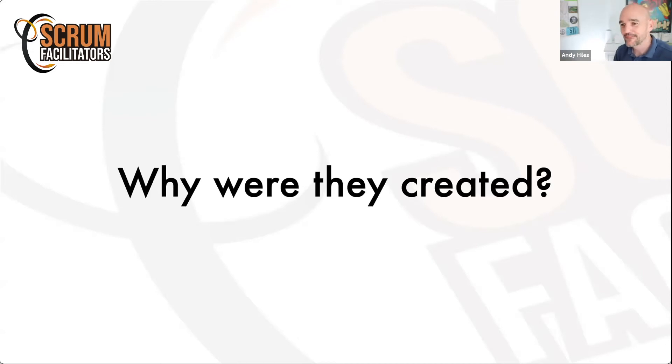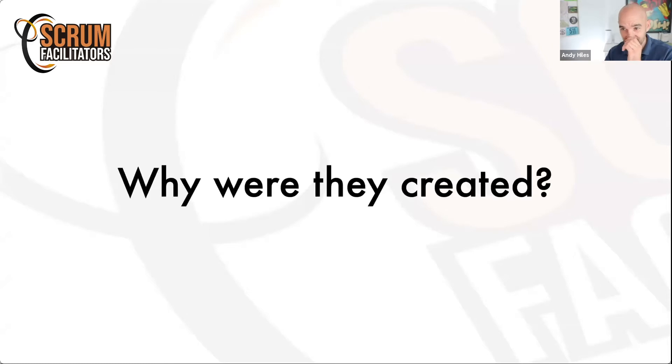Can anybody tell me why story points were created — what is the origin of story points? Story points originated from Extreme Programming. Ron Jeffries was one of the three people who created XP. At the time they were using 'ideal days' as a way of forecasting — man days, people days. What they realized was: when they said three days, it was probably taking six.